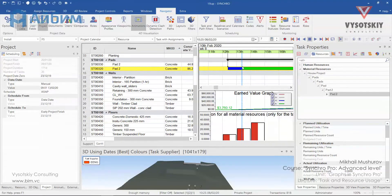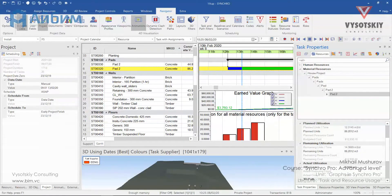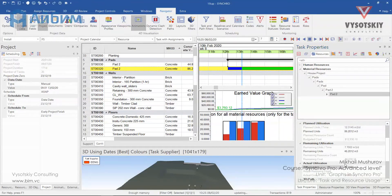Assume at this time and day we have poured 40 cubic meters of concrete. Select the pad concreting activity and let's say our actual value is 40 cubic meters. On 13 February we've managed to pour 40 cubic meters. Our planning rate was 12 cubic meters per day, so we're going ahead of schedule.